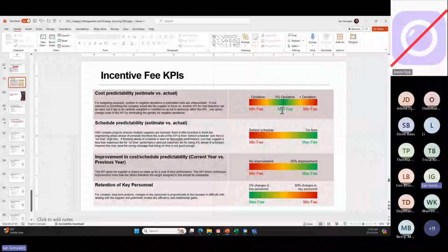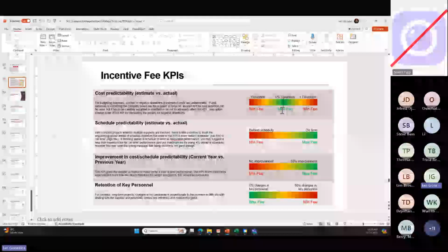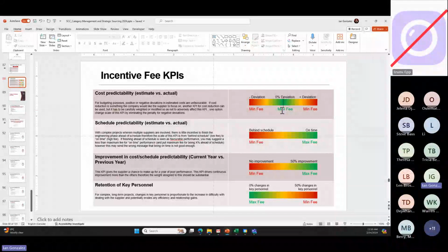So how I've made this work before is a contractor would approach me and say, here's the standard profit we have on our cost reimbursable. It's a certain percent, like a 9% profit. What I do, I put on the table, I'll make that 9% 12% if you can meet these certain KPIs, but it will go down to 5% if you don't. So I put his standard fee in the middle, and then I dangle in front of him.